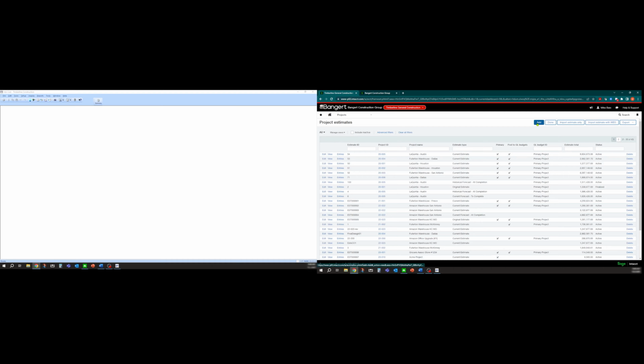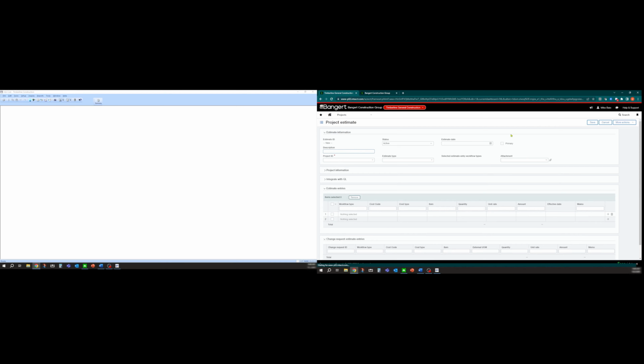So we'll go in and click add. And you can give a budget description. There's a little more header information that you can use for reporting. And the reason being is we can have multiple budgets in Sage Intacct. In 300, you get one estimate in the system. In Intacct, you can have multiple budgets.